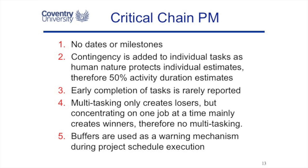The second concept suggests that people always pad their estimates. So when somebody gives me an estimate, I'm always going to cut it in two. Somebody says it's going to take two weeks — I'm going to plan it at a week, and don't worry, we'll do something about the time that's been lost.